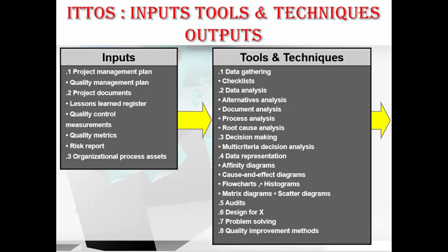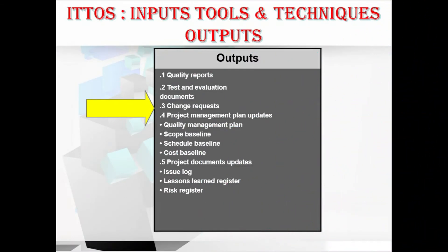The third input is organizational process assets. In tools and techniques, we have data gathering techniques consisting of the checklist, data analysis techniques including alternative analysis, document analysis, process analysis, and root cause analysis, and decision making techniques including multi-criteria decision analysis, and data representation techniques consisting of affinity diagrams, cause and effect diagrams, flowcharts, histograms, matrix diagrams, and scatter diagrams. Other tools include audits, design for X, problem solving, and quality improvement methods. Outputs include quality reports, test and evaluation documents, change requests, project management plan updates including quality management plan, scope baseline, schedule baseline, and cost baseline, and project document updates including the issue log, lessons learned register, and risk register.